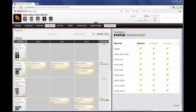Yeah, and I would add to that, I see some organizations will do what they call a long sprint zero. So they'll take maybe 5 or 6 weeks to do that first initial process instead of a 2-week sprint. But I would say concentrate on a particular persona, the most important one. Concentrate on the most particular details about that persona, the basics of what needs to be done. And echoing that minimum viable product, your goal is to get to the point where you start getting actionable feedback from those real people that persona is designed to